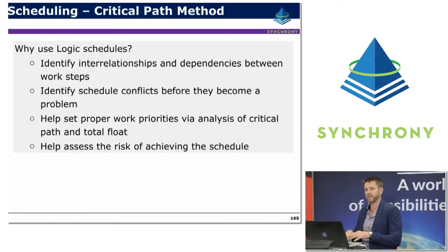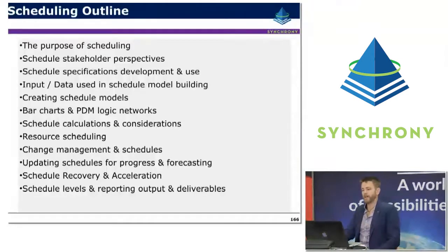Monte Carlo analysis, you've just got a brilliant tool for running all sorts of different scenarios, all sorts of different models and approaches to mitigating risk, exploring which ones in the model seem to yield the best outcome, and then basing your overall plan on that before you lock in the baseline. So by analysing risk, and even if you're not using the quantitative tools, just qualitatively having that dialogue and that discussion and allocating appropriate contingency into the model before you set your baseline is worth its weight in gold.